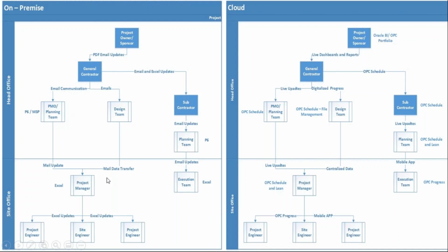Basically, on-premises you also have the option to implement team member for the progress update and get it into the schedulers with Primavera P6 EPPM, and then the dashboard on top. When you want such setups, you need a bigger investment. Here you have the options to implement the same: the mobile app for progress on the downstream side for the site people, the core product for the schedulers and planners, then the dashboards, reports and other information for management. So everybody's on the same page, and it's pretty easy to work together and integrate.